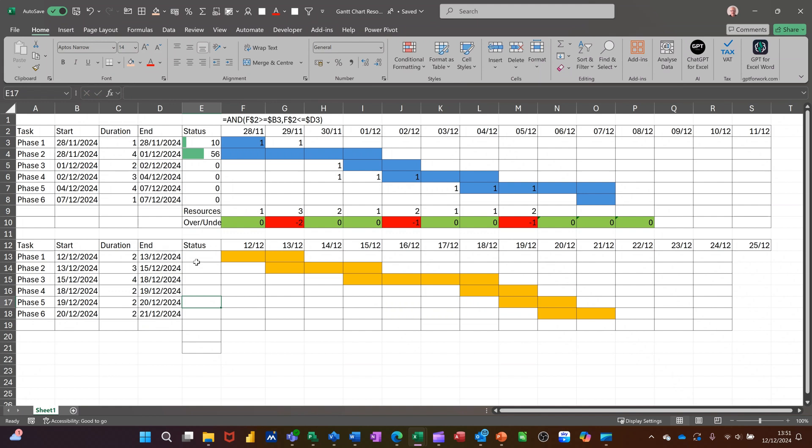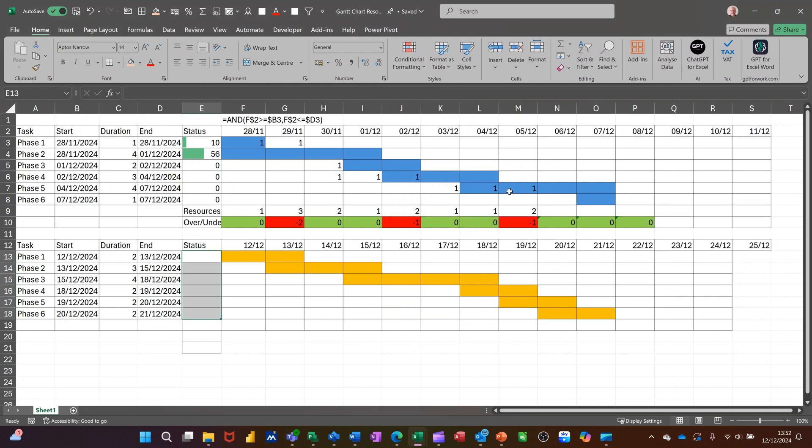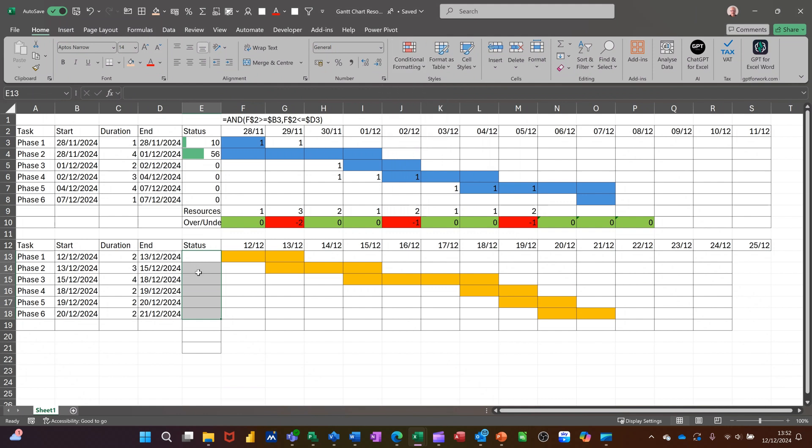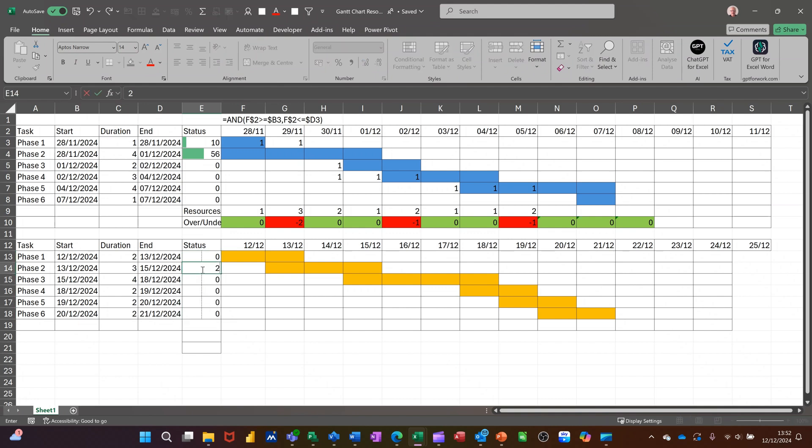Now, to do the complete, I need to do a little data bar. So it's conditional formatting again. This time I'm going data bar. Pick in any one of these. Data bar. And there's no figures in there. So if you type some figures in there, let's go, let's say there's zero complete all the way down. Zero complete.